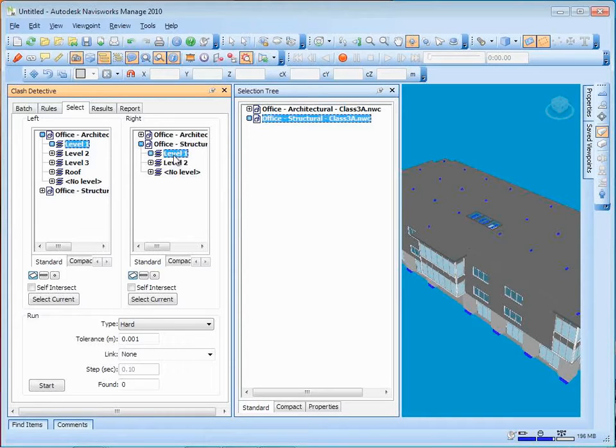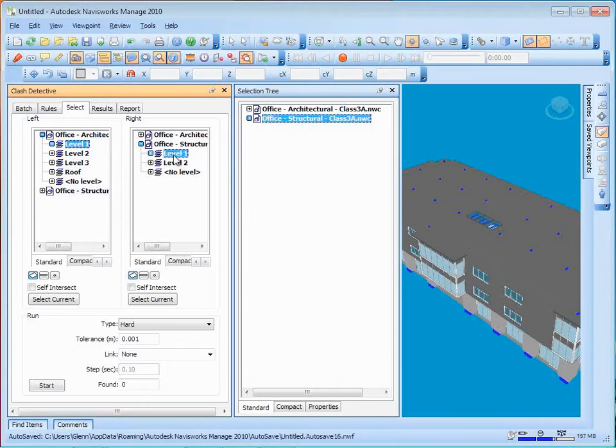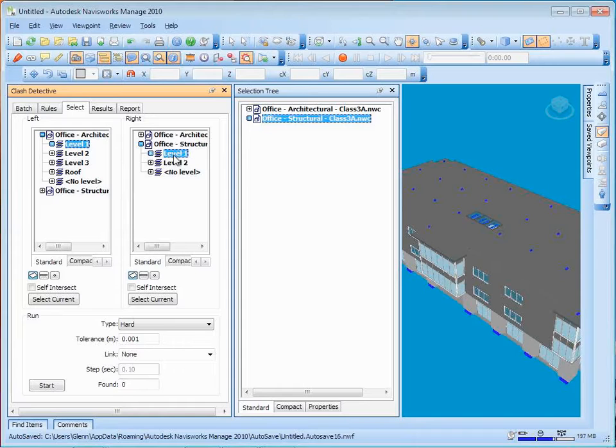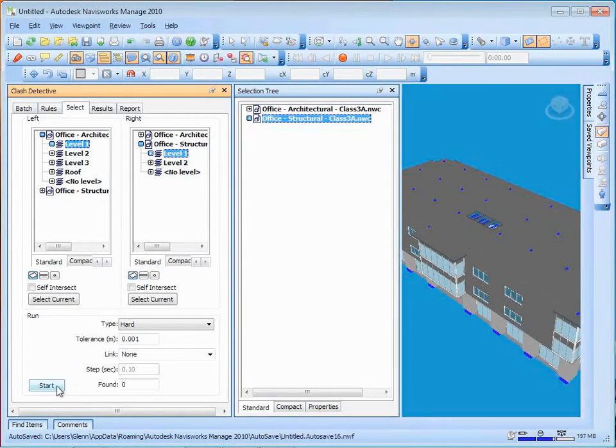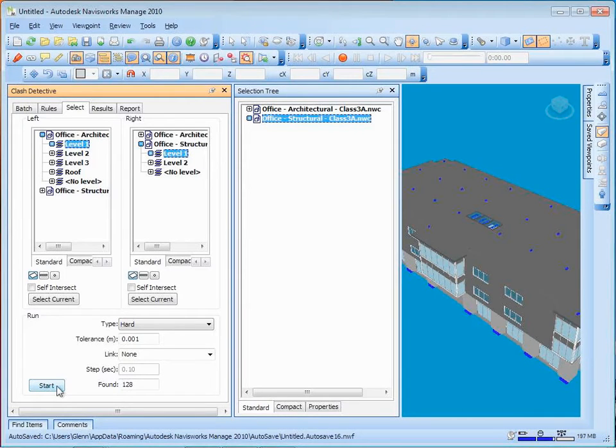The deal is, as you go through an intersect, especially the first few times you do this, you can come up with thousands of different things that are actually on top of each other because they belong on top of each other. And so just sort of saying intersect the entire model against the entire other model really is too gross. It'll give you too many things that are potentially errors, and it'll take you a long time to sort through it. So better if you can kind of sort things out a little bit better.